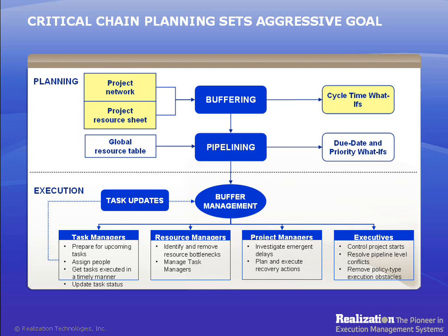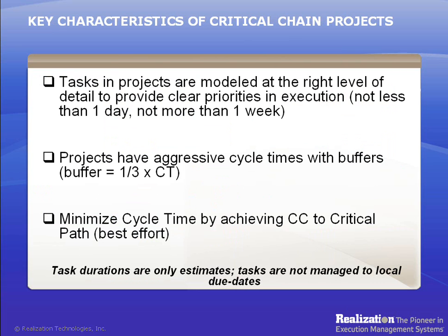There are three key characteristics to a critical chain project. First, tasks in a project should be modeled with the right level of detail to provide clear priorities. Here are some guidelines: limit the number of tasks to 300 tasks per project; the task duration should be no less than one day and no more than one week; tasks represent groups of work. A task should not be broken into several tasks just because it requires different resources for different durations of time. However, it should be broken for specific key resource types, in which case a separate task should be defined with that resource assigned over most of the task duration.